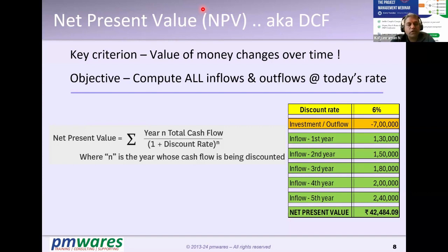The same 10 lakhs will not be able to give you the same margins 3 years down the line, in the 36th month or the 37th month, because against that revenue, whatever services or components you are going to purchase and deliver, the cost of those will definitely go up based upon your past experience. Now, this is the reason why you factor in this cost of money and term this as a discounting rate. Here is where the discounting rate makes sense. I hope you understood now why this is being done and how this is calculated.